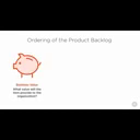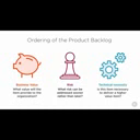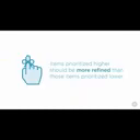Now, priority can be a function of many different factors, such as potential business value to the organization, risk of delivery, or even technical necessity in the case of an item that simply must be completed so higher value items can then be worked on. Regardless of how the product owner has chosen to prioritize the product backlog, you should expect that items higher in the backlog will be more refined than those items lower in the backlog.